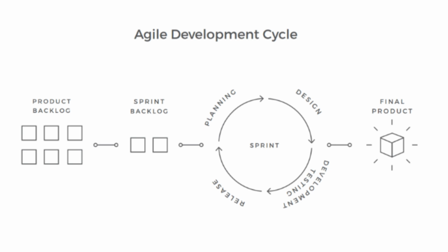Now, Scrum actually relies on three main artifacts, including what I initially mentioned. We have, as part of those ceremonies, like I mentioned, the product backlog, which is an ordered list of feature items that might be needed in the project's final product. The backlog updates as new requirements, fixes, features, and details are changed or added. So if you're giving your report and there was a change or an update that you added to your backlog, that can also be reported.